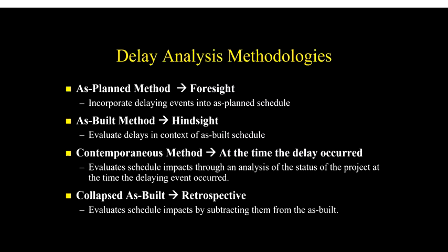Of course, a great deal of justification will be required to justify why the critical path is what it is if it was recreated, because it is possible that multiple possibilities could be created to recreate the critical path, and the chosen one will have to be justified.